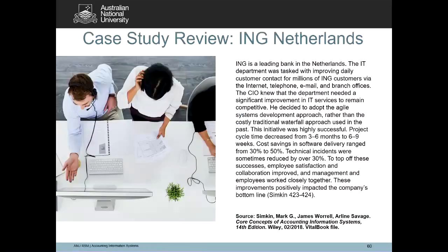So this is a case study review from ING, Netherlands. It's an insurance company. What happened is they needed to improve the IT services for the company, and they decided to adopt the agile system development approach rather than the costly traditional waterfall approach used in the past. This initiative was highly successful. Project cycle time decreased from 3 to 6 months to 6 to 9 weeks.